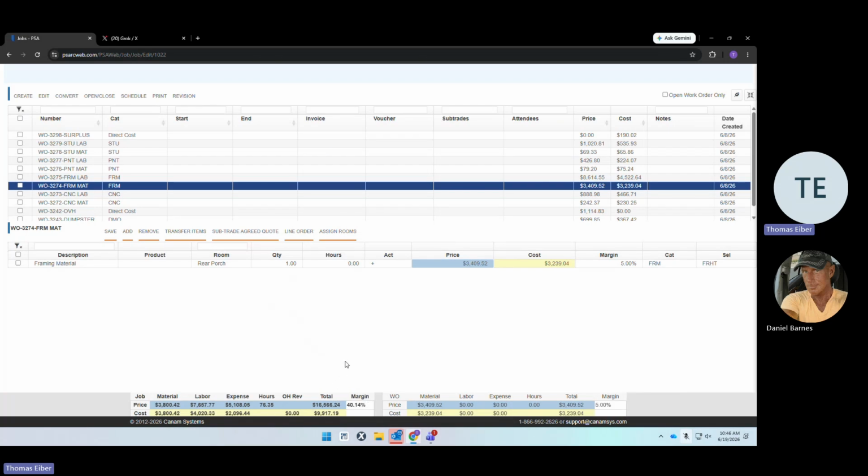We can continue on. If they're not, you need to have a conversation with the estimator because this did not come over with the approved dollar amounts. It never should have hit the authorized to proceed step because the numbers don't make sense. If you meet with the estimator, it's determined that there was an exception, that's fine, but you at least need to ask the question so you can cover yourself.